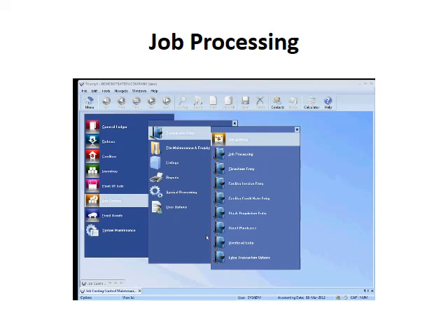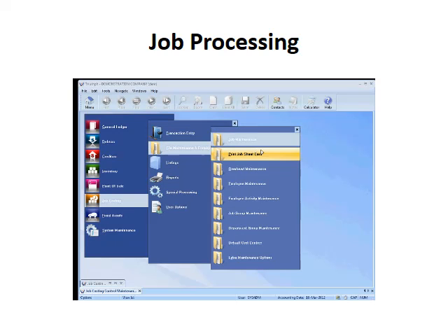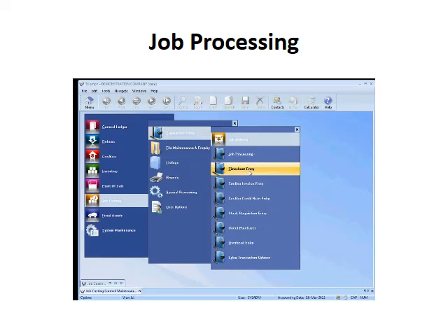In some of the previous videos, we've sort of gone through the processing of doing individual timesheets, creditors, invoices, stock requisitions, direct purchases, overheads. But we do find that some environments, clients have situations where they actually produce a job card. So if you actually went in, you produced your job sheet, that job sheet is then given to the staff, and the staff then write on there the parts they used, the time they did, anything else that required to go on that job. And in a normal processing situation, that would mean you'd have to go into timesheets, creditors, invoices, stock requisitions as a separate job. There is a combined function called job processing.